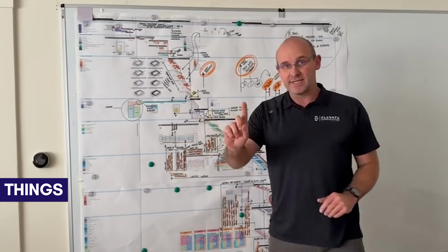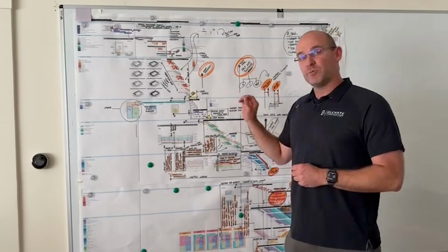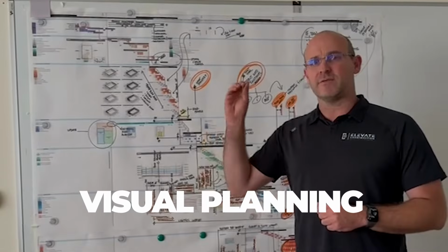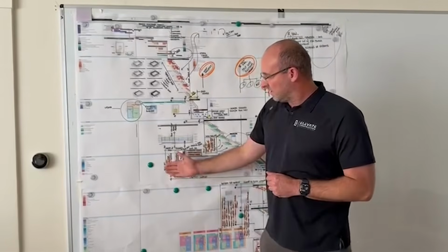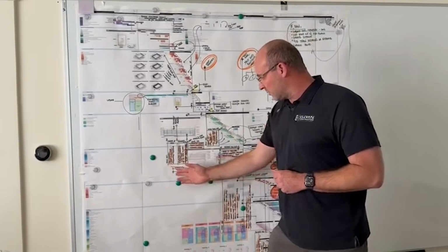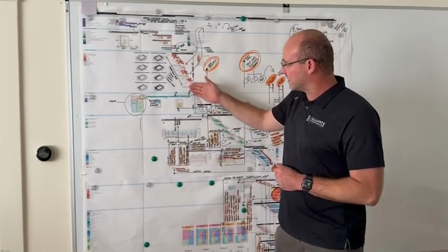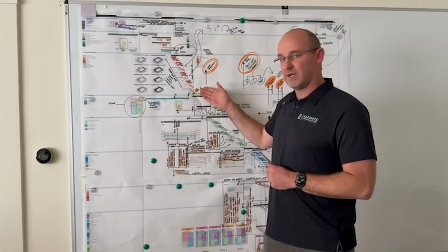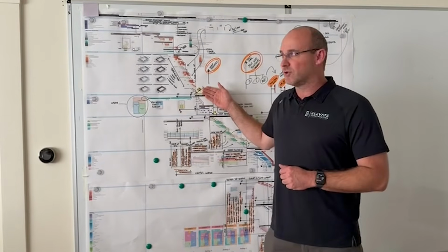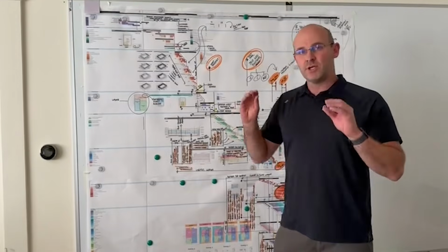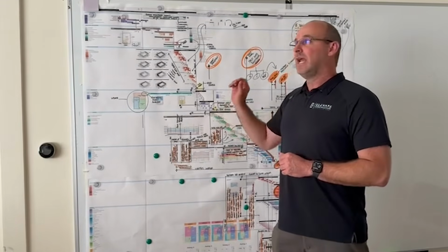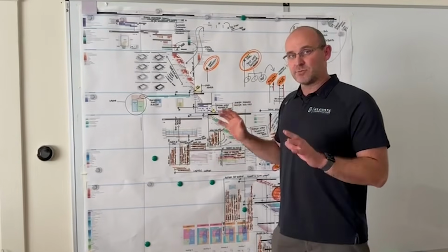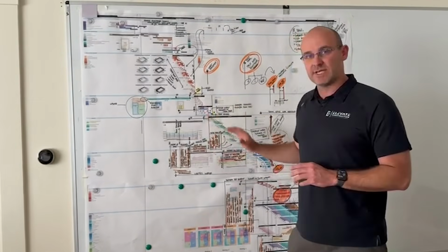Last thing I want to say, in takt planning, you might as well call it visual planning. How are we going to have discussions about the rally cry for a certain phase, or what resources we need, or what tactics we're going to use, or what our risk profile is in a CPM schedule? You're not going to have these kinds of human discussions in a CPM schedule, but you can in a macro level takt plan.